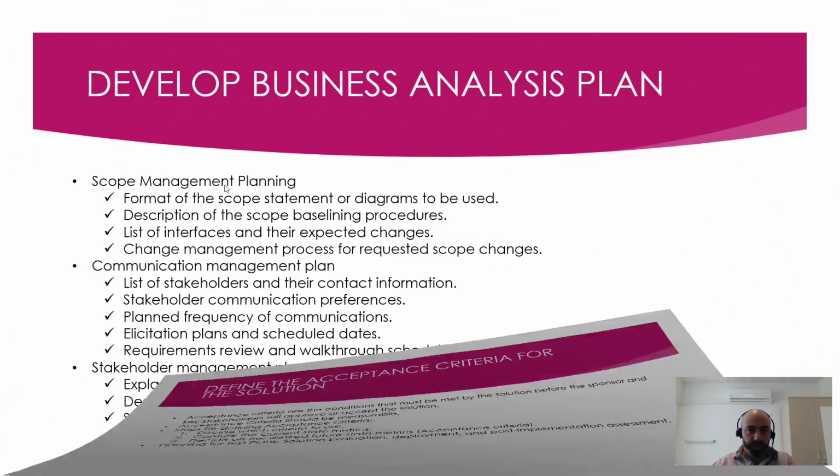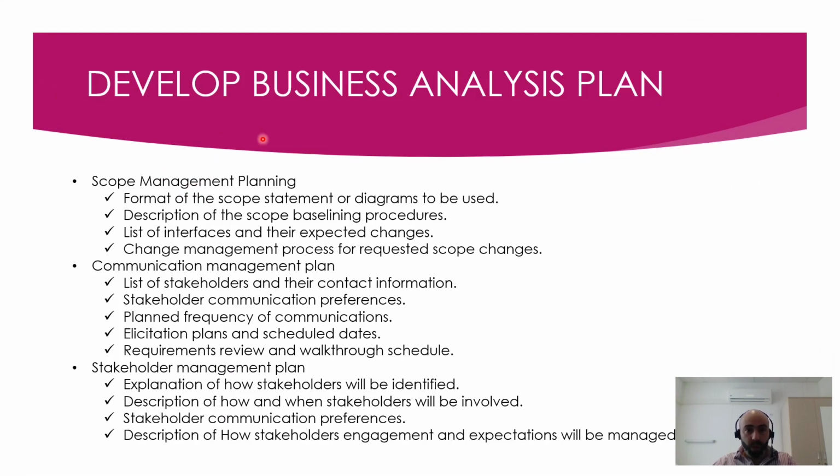So, what are the contents of the business analysis plan? Scope management plan. The scope management plan is part of the project management plan, and it contains the format of the scope statement or diagrams to be used. Could be a context diagram, use case diagram.